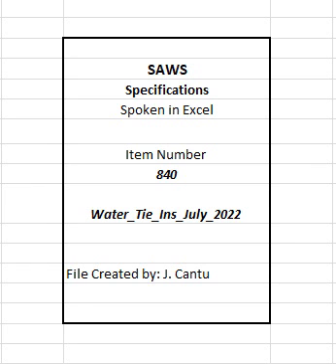The 25 calendar day notification is required for all shutdowns to account for cases where the shutdown affects a significant number of SAWS customers, critical services, or when an extended shutdown duration will negatively impact customers.